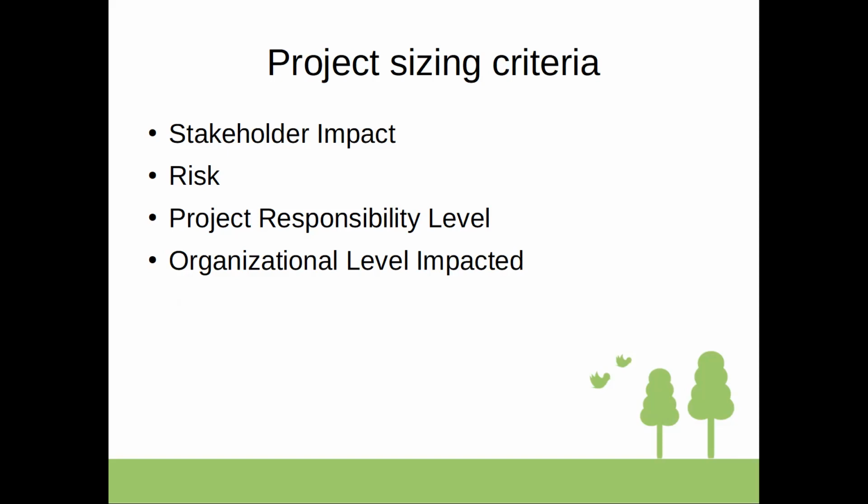But there is no leading criteria. Any of these can be the leading one. So for example, if there are, let's say, 10 people involved, but it requires a major system change where the cost for the system and the development will be very high, we can consider it a higher size of project, even though it's just a few people, or up to 10 people involved.